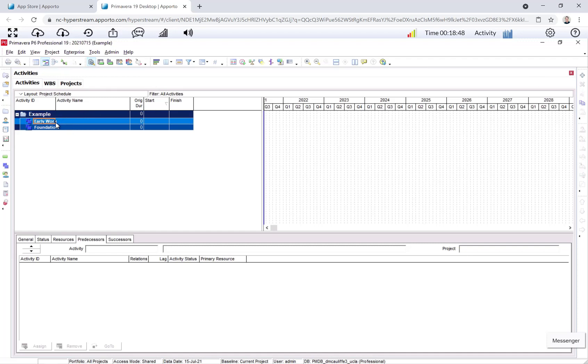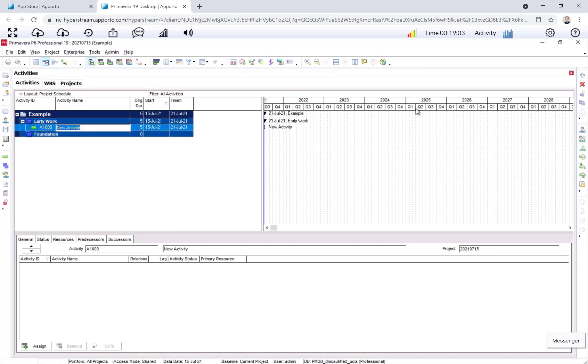To create the activity, I select the WBS element that I want to work in, which you can see by this little orange box of where I have selected. We just want to have it selected so that when you click this plus sign for an activity, the activity we're adding inserts itself within that WBS.